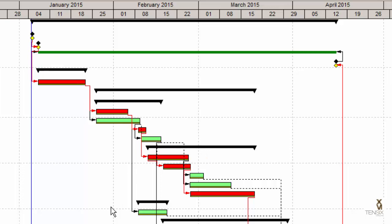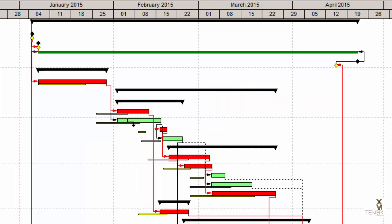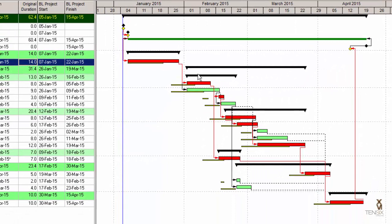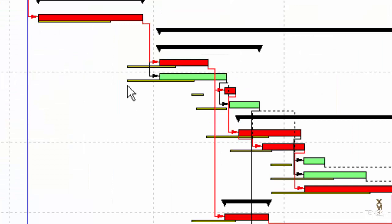Let me demonstrate by changing the duration of this activity by some amount. It was a critical activity, so it's pushed the whole schedule out. You can see if this one slips, everything's going to slip. If that's where it was supposed to start, this is where it's going to start now — that is your variance. And without a baseline, we wouldn't have been able to see that.